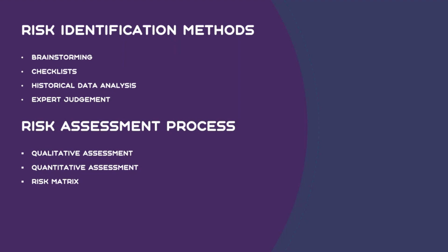Against the delivery, you will put good, bad, or best. In delivery time, you will put good, bad, or best. Similarly, for the after service, you will put good, bad, or best. So basically there is no amount, no figure against that. Instead, you're putting a quality measurement. Or sometimes you may put 30 percent, 40 percent, or 20 percent. For example, if he is delivering on time, you will put 100 percent. If there is a 1 day delay, you will put 20 percent, something like that.